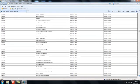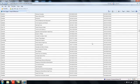So just to recap, ClaimDigger is a utility. It's launched within P6, but it's actually an outside application. And the purpose of it is to compare two project plans to show you items that have been added, deleted, or changed.